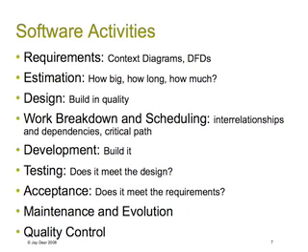Once you have some idea of the requirements, typically cost estimates are based upon requirements rather than dreamt up. So you can think about how long, how much, how you're going to do this. And again, some of those requirements metrics can be used. So you can look at things like function point analysis. You can look at how many screens there are to be used, how many data stores, what elements of data are being stored, and use those to derive estimates of cost, time, team size, the things that you need to do. You can also base this on previous experience, like with a house builder.